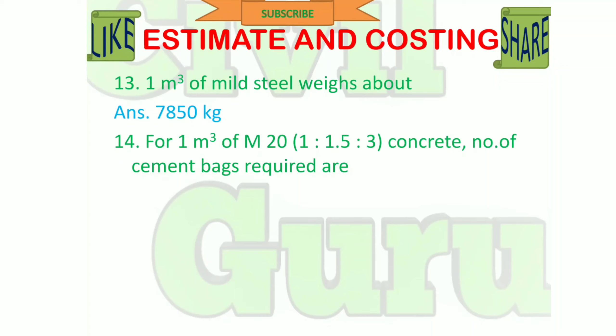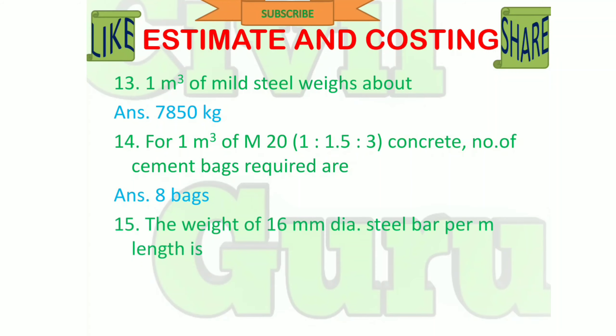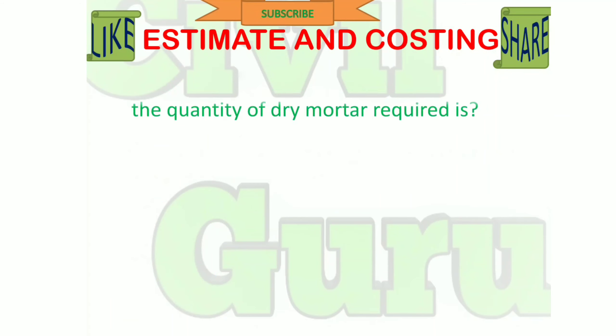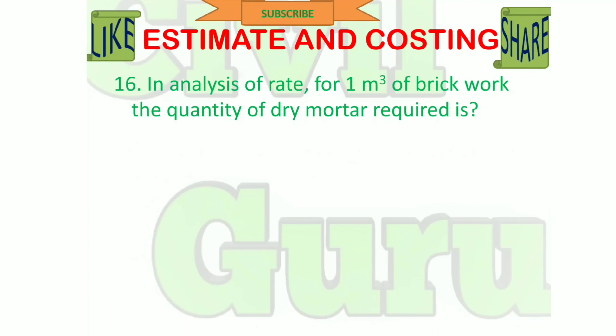For 1 cubic meter of M20 (1:1.5:3) concrete, the number of cement bags required is 8 bags. The weight of 16 mm diameter steel bar per meter length is 1.58 kg. In analysis of rates, for 1 cubic meter of brick work, the quantity of dry mortar required is 0.30 cubic meters.